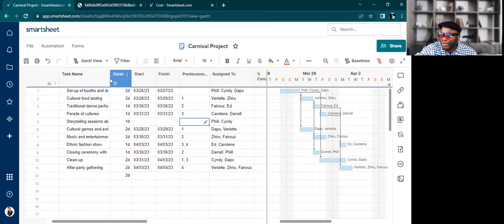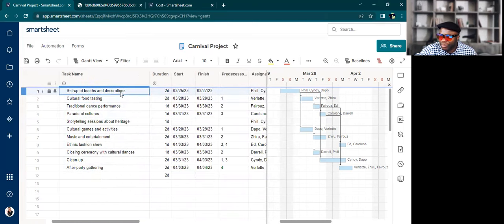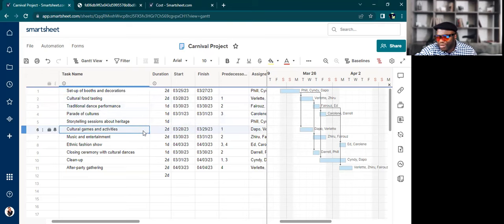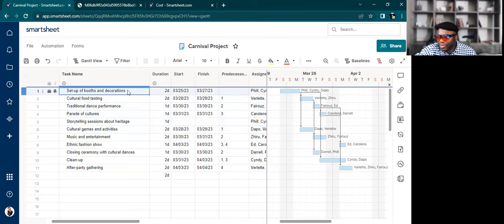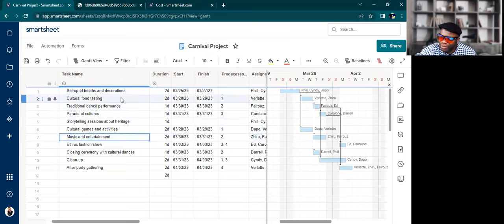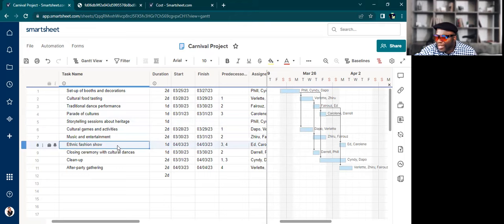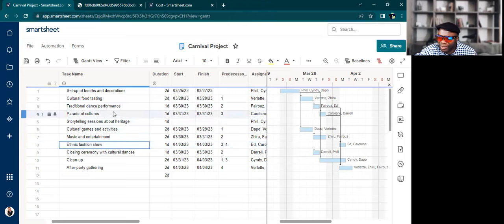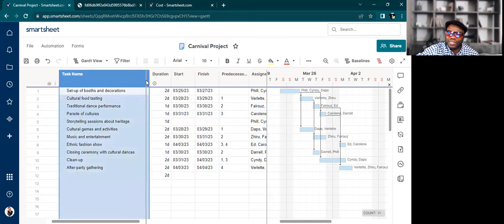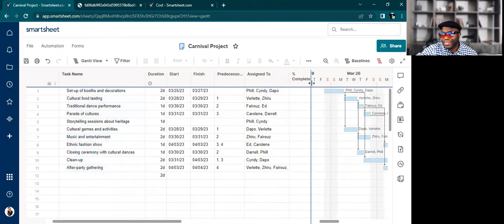If you take a look at all of the activities, cultural food tasting. Yeah, we do need the booth set up. But we don't need to go in this direction. We could do cultural games and activities after the booth has been set up. Music and entertainment. Well, people generally want to eat first, right? Before the music and entertainment, so they don't run out of gas. Ethnic fashion show is dependent on three and four. So parades of cultures, it makes sense. So GPT didn't just spit stuff out as an afterthought. This actually does make sense from a logic perspective.